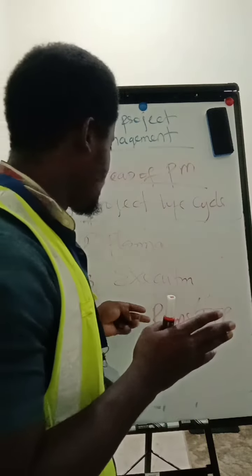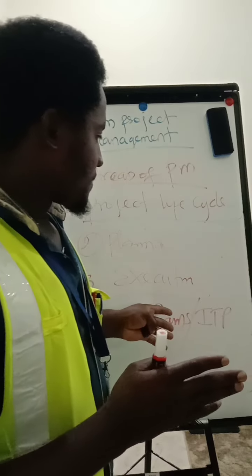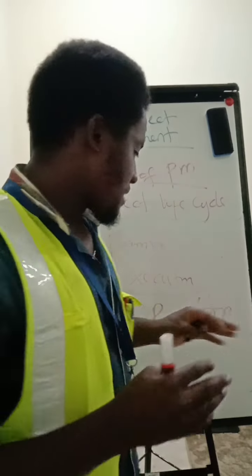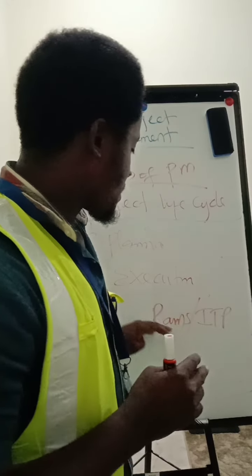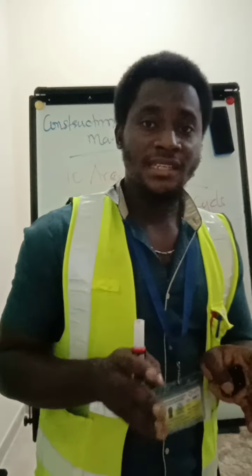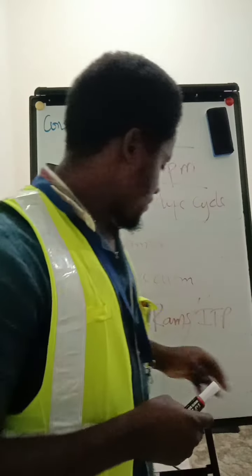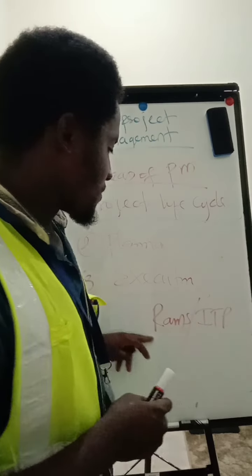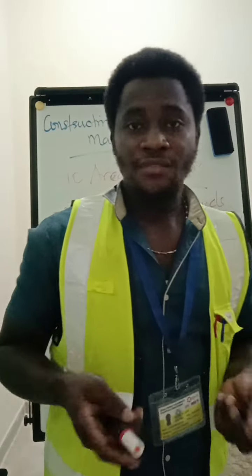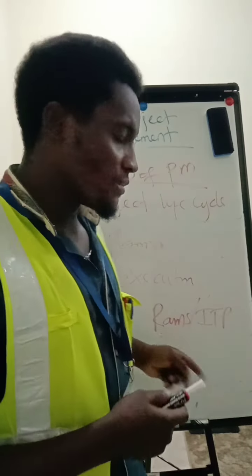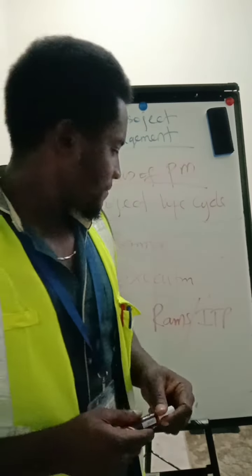comments as maybe some comments might be a little bit greater than the other. So we will classify the ones, some other comments which are generated and then transferred to as the NCR or the non-conformance report. So that we will get from the consultant is going to generate that, and then we have to close all of them before we move to the closing of the project and handing over to the client.